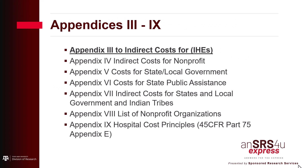Appendices 3 through 8 provide criteria for establishing indirect costs for various types of entities. Appendix 3 applies to institutions of higher education and provides criteria for identifying and computing indirect cost rates. Indirect costs are those incurred for a common or joint objective and therefore cannot be identified readily and specifically with a particular sponsored project. Appendix 9 contains hospital individual cost principles, which are separate from those contained in Subpart E.